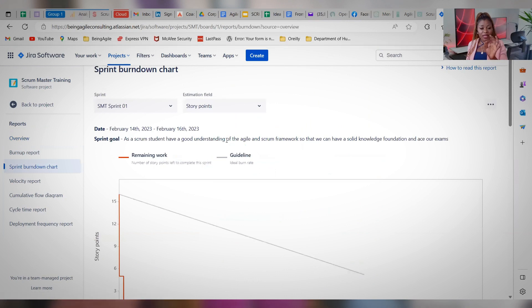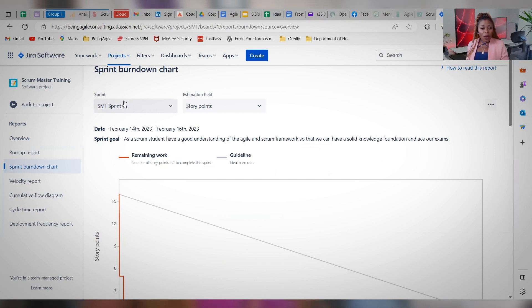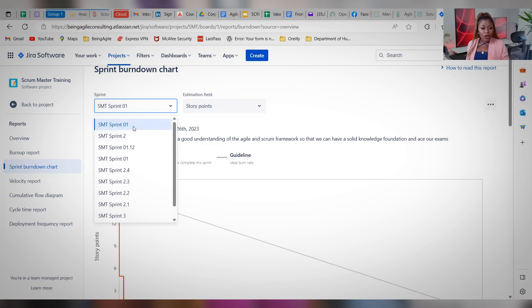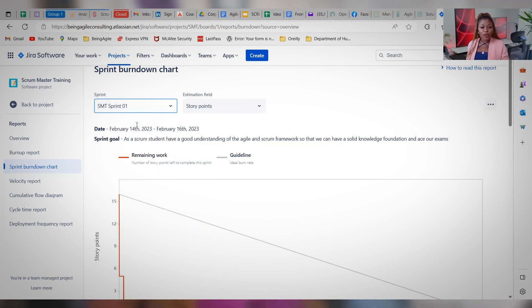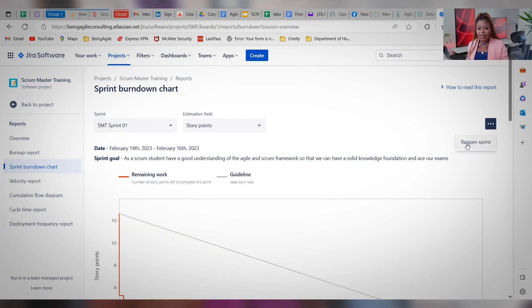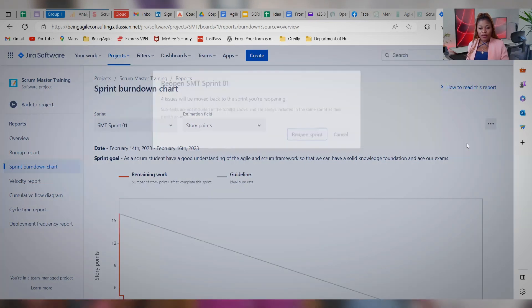There may be different ways, but let's just focus on this one approach right now. Once you select Sprint Burndown Chart, the very next thing you want to do is go to the sprint that you want to reopen. If you click where it says Sprints right here and click on this little dropdown button, it will show you all the closed sprints. Once you have all the closed sprints, click on the sprint that you're trying to reopen. Come to this little three-dots menu right here, click on it, and you'll see it says Reopen Sprint.